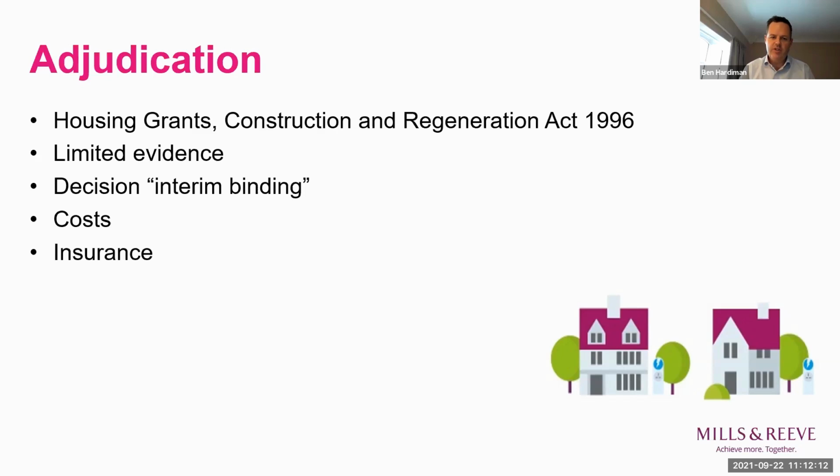More often than not, adjudication is used to address questions of delay, disruption, payment disputes within the scope of an ongoing project. But the reality is that this is a statutory mechanism. It was created by the Housing Grants Construction Regeneration Act back in '96, and it gives the party a right to refer a dispute arising under a construction contract.